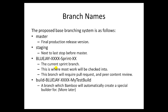At the end of the Sprint, a final pull request from this Sprint branch into probably staging would be done by the Scrum Master, and then that Sprint would be pushed forward for testing. There are also a couple of special naming conventions built in. For example, if you make a branch of your branch and put the word 'build' in front of it, this causes Bamboo to automatically create a special build for that branch, so you can preview it using a build agent directly on the Bamboo system. Naming is really important. Remember, master is our final destination, but you may be checking into other destinations rather than master.